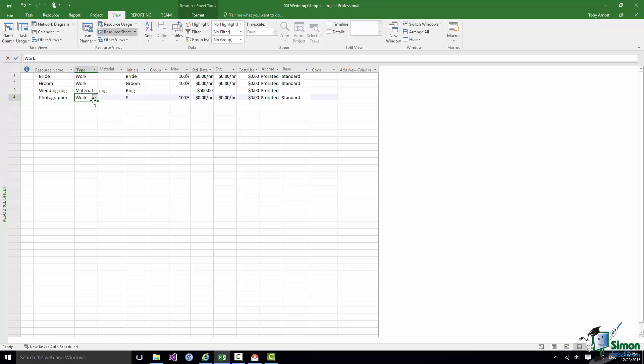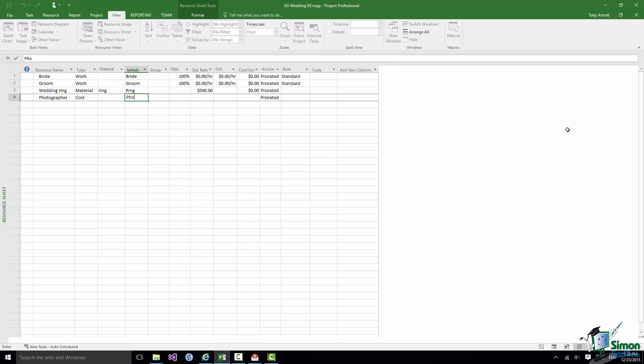The initials I'm going to apply are Photo. Now you notice there that there is no highlighted cost rate field with $0.00 or whatever as we have before for work or material resources. And in fact the best way to record the cost of a cost resource in a particular situation is to assign that cost when you assign the resource to the task. And I'm going to show you how to do that a little bit later on. At the moment the important thing is that we have listed our cost resource here, Photographer, and of course with this project there will be many other cost resources.